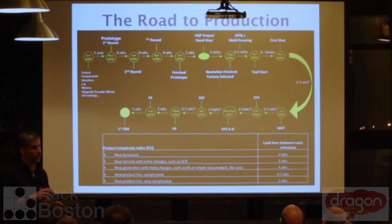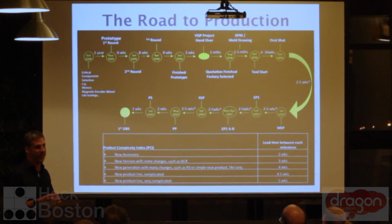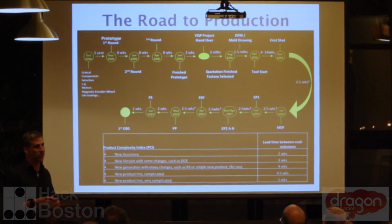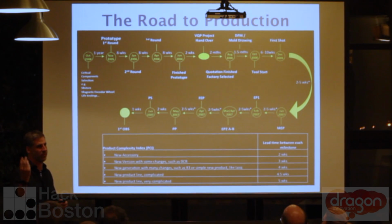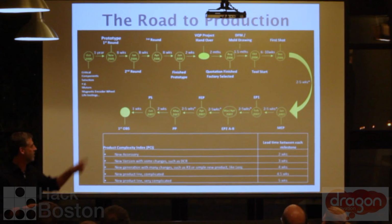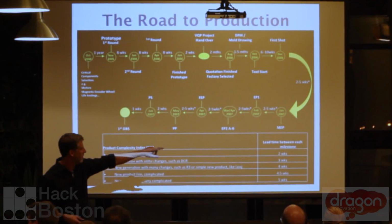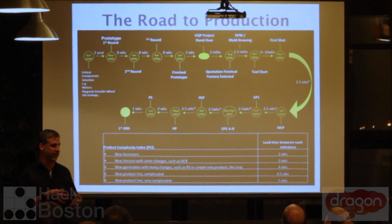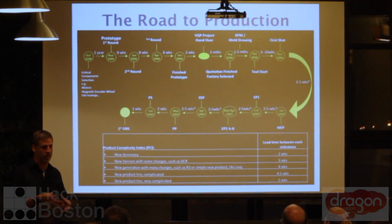Often what happens is you get a short shot, so the part doesn't fill completely for whatever reason. It may not be pretty, it might have burn marks. You get some really cool tie-dye effects because they'll use junk resin that's probably all different colors, so you get some good swirly things. Then it goes into engineering pilot 1, where you put it together and put the boards in, but it probably doesn't work very well.